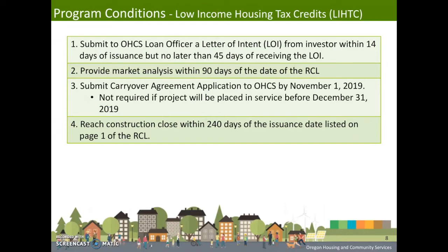Passing the 10% test allows the partnership to postpone the project placed in service date to the end of the second calendar year after the reservation year. Lastly, projects need to reach construction close within 240 days of the issuance date listed on the reservation conditions letter.